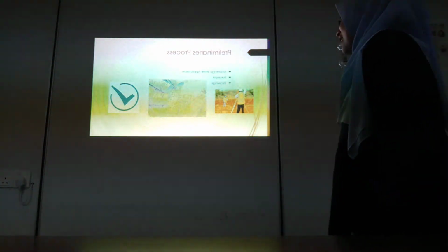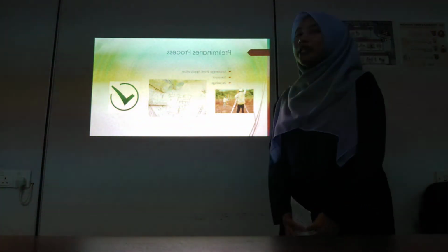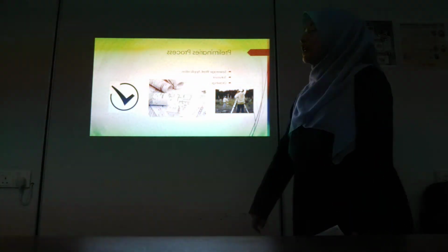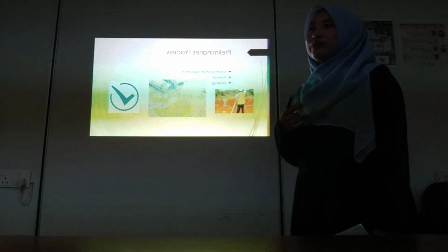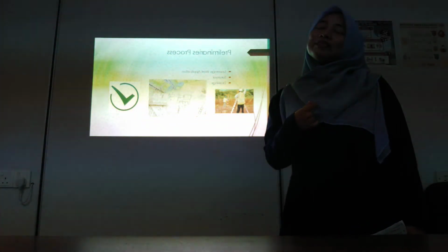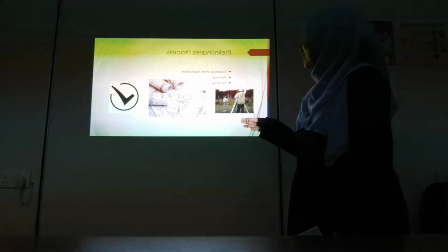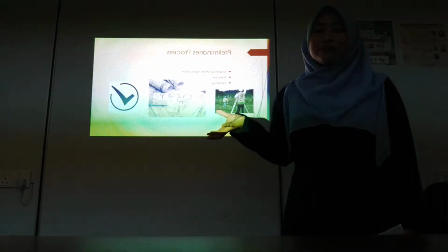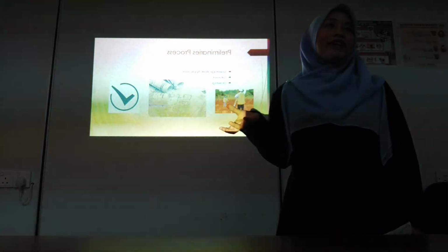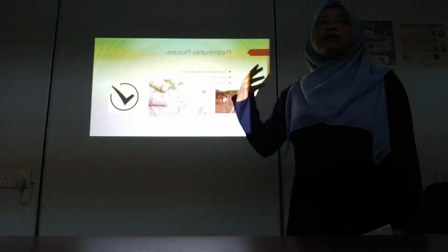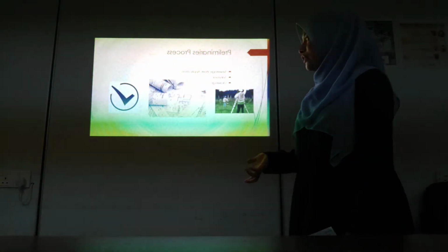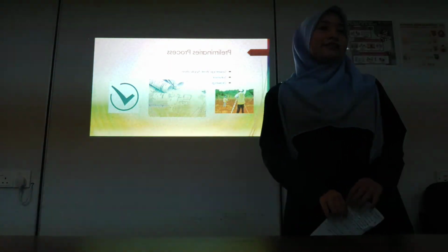The preliminary process, during PDC1 and PDC2: the sewerage work application must be sent to the panel, which includes the survey of the site to identify the condition of the soil, whether it is suitable, or any point that can be made for construction, and then the drawing by the consultant.